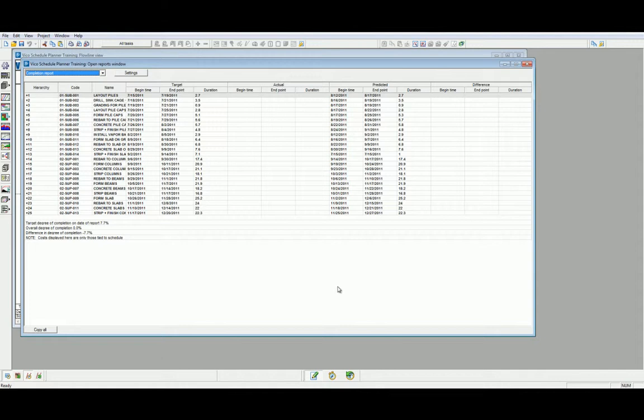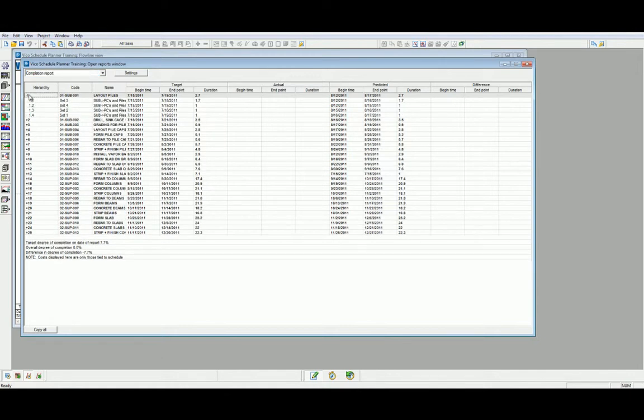This report also gives you an insight into the schedule trending patterns and why that information might be trending. We can break down tasks individually to find out exactly what the target, actual, predicted, and difference in the production data by that task.